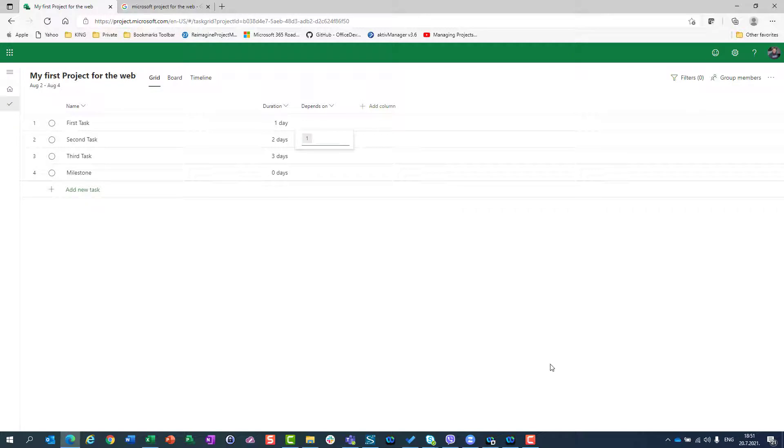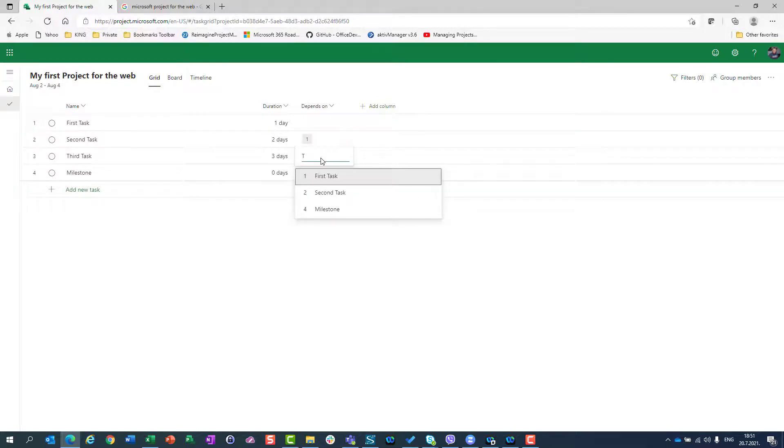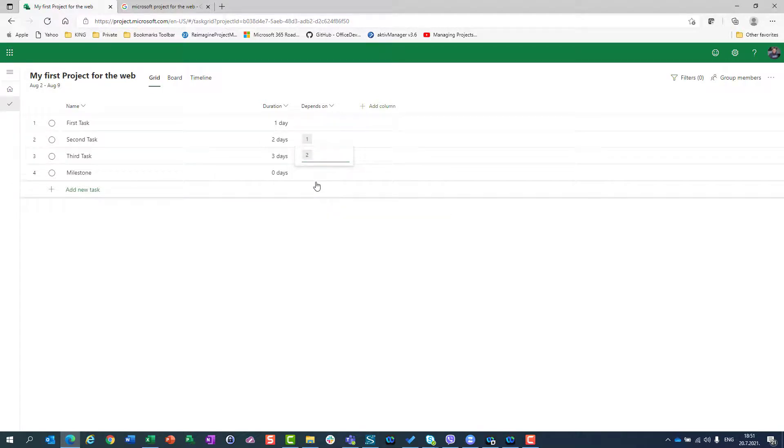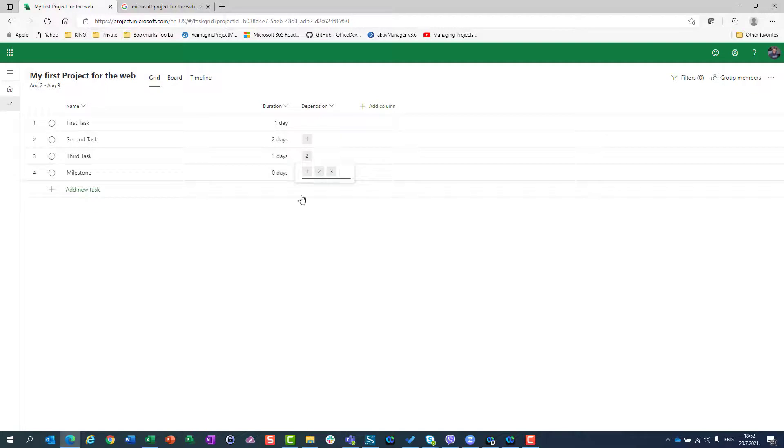Let's say that my third task depends on second task. And I will click on task and I will click now T. And I will have all tasks which have a T letter in their name. So I will say task, second task. I will choose second task. And now I can do also that on milestone. And I will say that my milestone depends on first task, second task and third task. And I built my schedule.